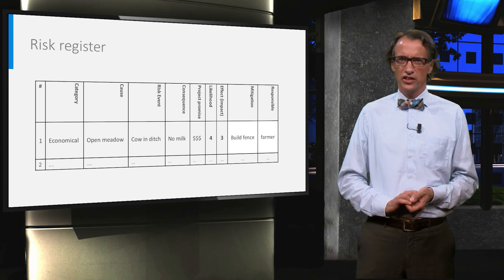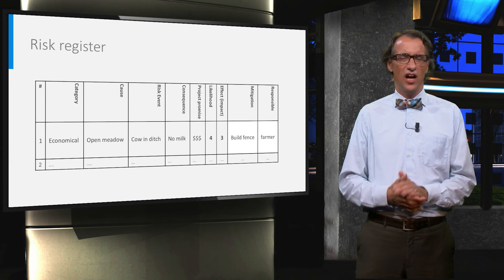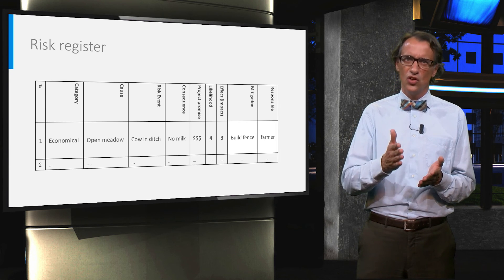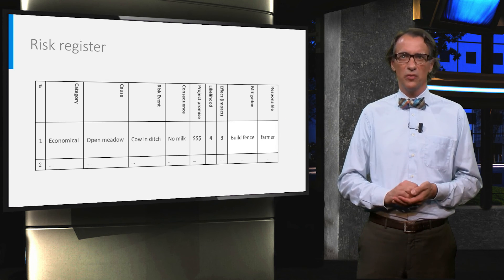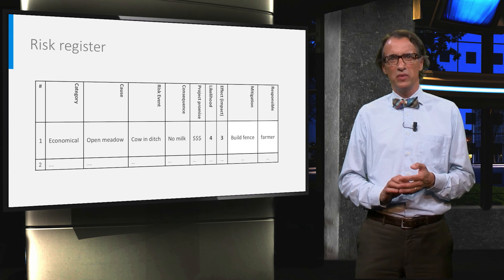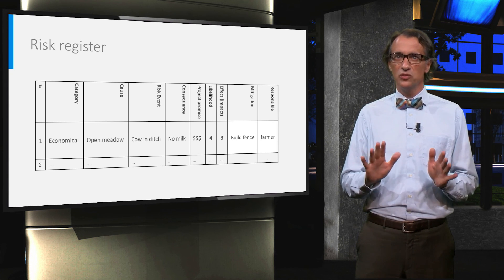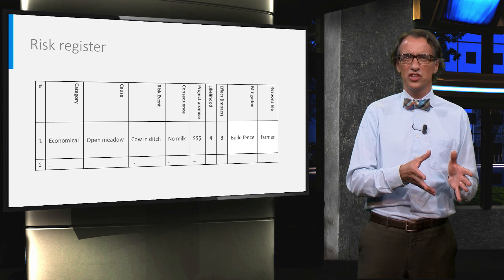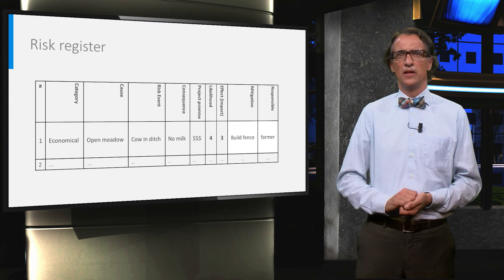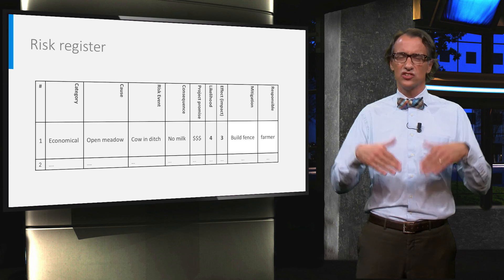You can use a risk register to systematically store the identified risks and the proposed mitigation strategy. Using the example of the cow, after category, you can see that cause, event, and effect or consequence are mentioned. Further on, the likelihood and effect or impact are presented. Also, the mitigation measures taken and who is responsible for the risks are listed in the risk register. Risk management is not a one-time exercise — it is a process that starts in the early project phases and needs attention throughout the whole process, even more because the project might really benefit from upside risks: the opportunities.